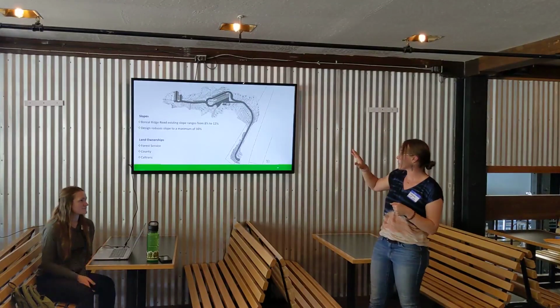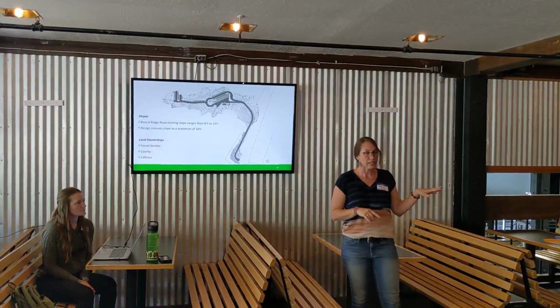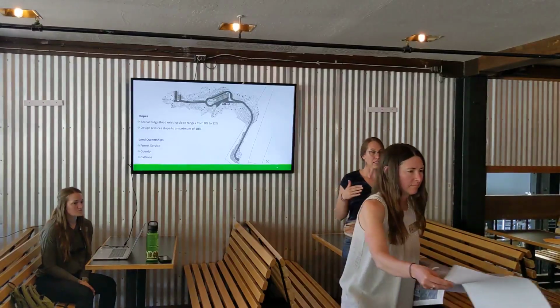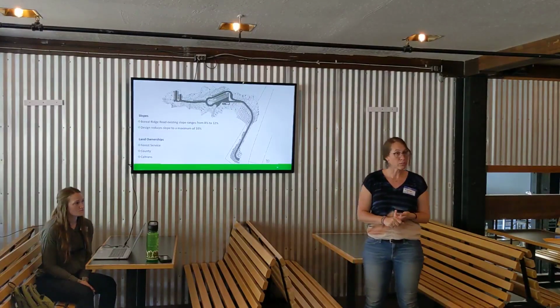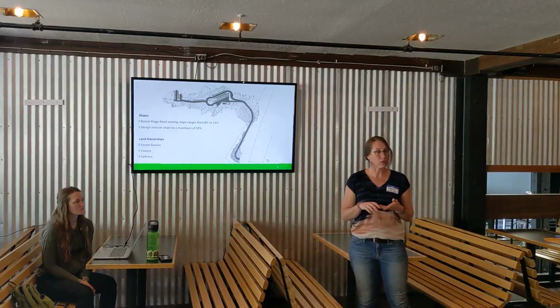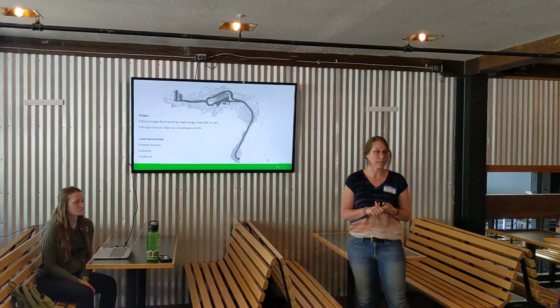With that, this is really small, so we also have handouts. This is the 65% design. Again, at 65%, there's still time and progression. This 65% level is to show that this is feasible, the grading is doable, the drainage is doable, the site works, and we're avoiding as many of the constraints as we can. So we're mitigating those impacts.